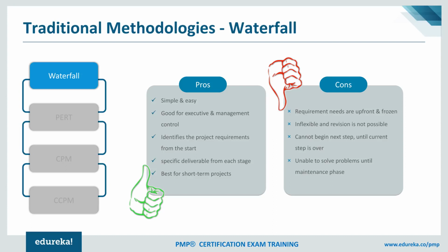Waterfall methodology could be applied to projects where things are known upfront. So if you think that you know everything about the project in terms of requirements, very few changes are expected, the duration of the project is small, and the complexity is not as high. For example, evergreening projects or migration projects, wherein things are pretty much clear in terms of what exactly you are migrating and where exactly you are migrating. From a technology and requirements point of view, if things are known, that's where the waterfall methodology could be used. I hope this clarifies your question.